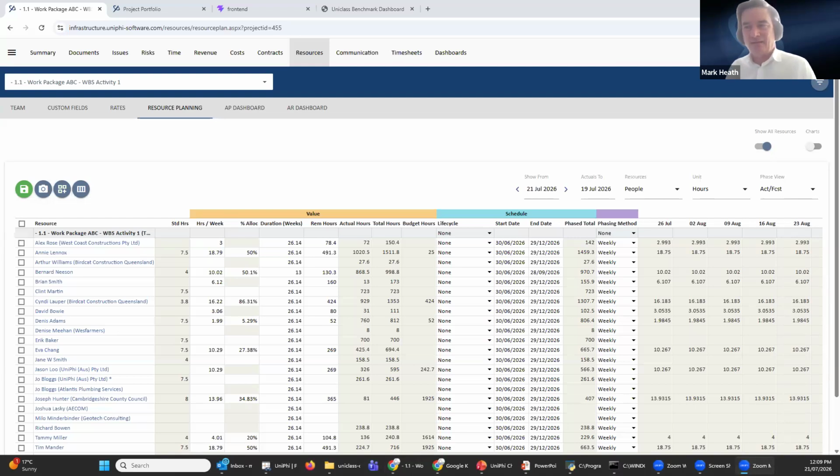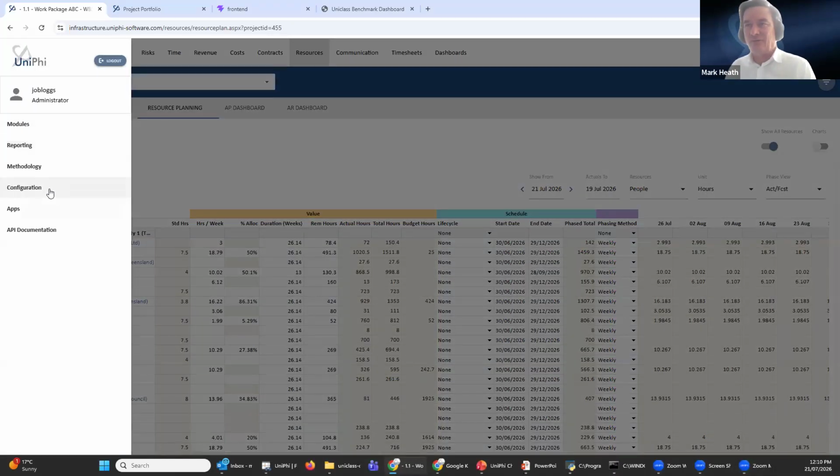So we don't just update the data, we create a transaction record of it. So we adjust it like a debit and a credit. If it was 8 hours, it's now 10. There's an additional 2 so that we know it was 8 and it's now 10. If the rate was $100, it's now 110. We give it an extra 10 so we know that it was 100 and we have this history that we can transparently present. Then there's all the rules around contracts and all that sort of issue.